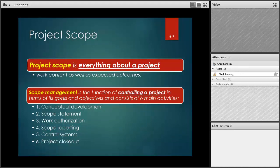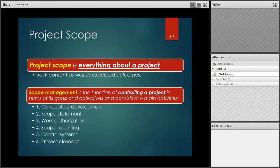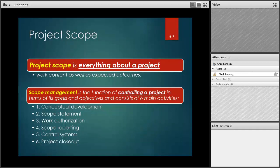There are six main activities that help us with scope management. One is conceptual development — getting an idea of what's going on. We need a scope statement to outline what we're talking about. There's work authorization, saying yes it's okay to proceed. There's scope reporting, which tracks where scope may be drifting. We want to ensure the scope doesn't drift too far off course, otherwise we go over budget and over schedule. And finally, project closeout at the end.